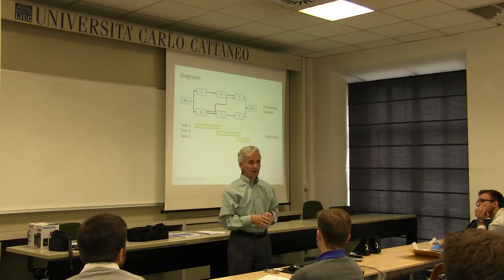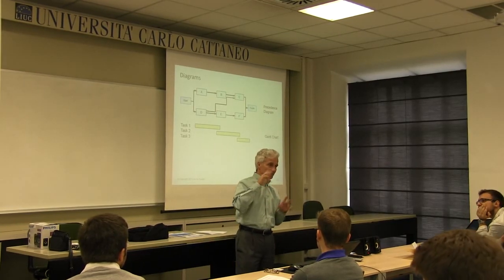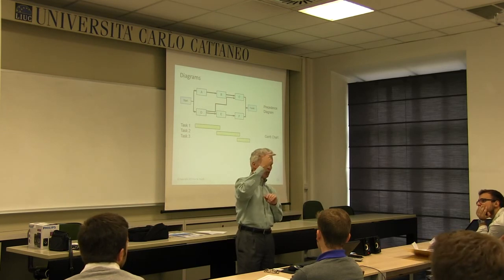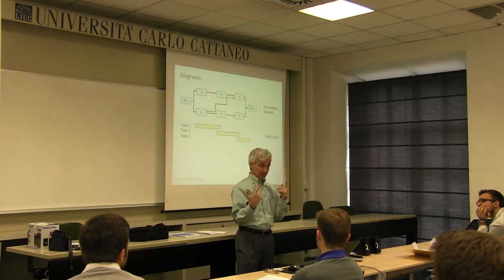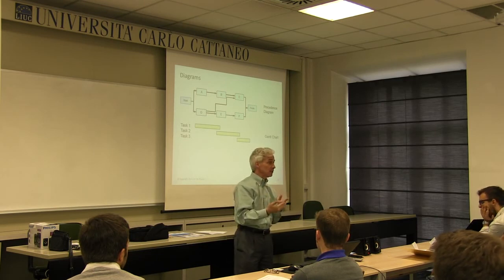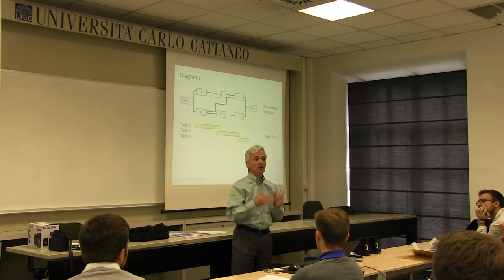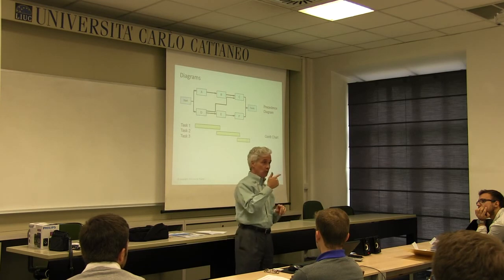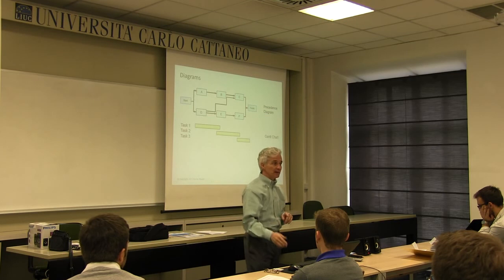That's absolutely wrong. The schedule represents who will do what, when, and all of the relationships among those tasks, and all of the details associated with each task. All the resource assignments and the availability of resources all go into the schedule. A Gantt usually only represents who and when. So a Gantt is not a schedule. A schedule is not a plan.